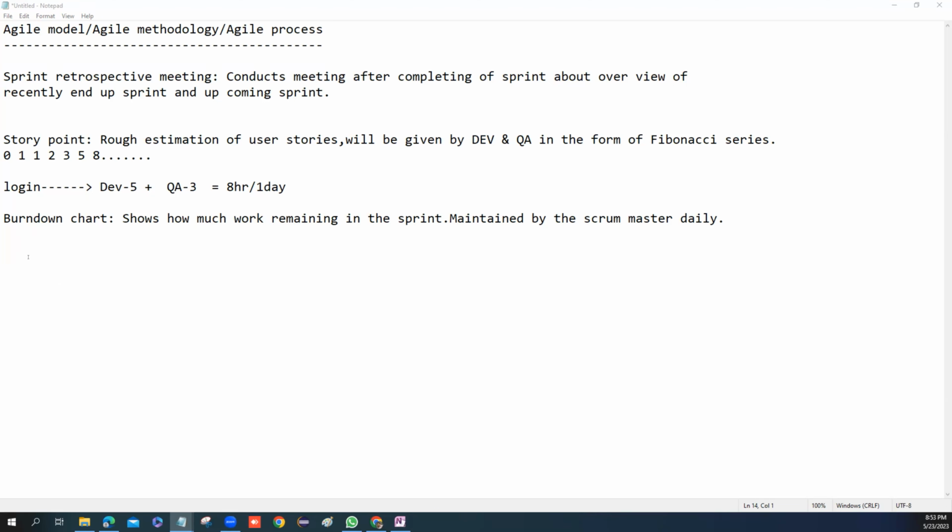After that, we pick 5, where we pick 5 in the sprint planning, right? After the sprint planning, if we select 5, now we need to work on those 5 items, right? So for each item, before they start working on it, in the sprint planning session, they're going to put that effort as a story point.